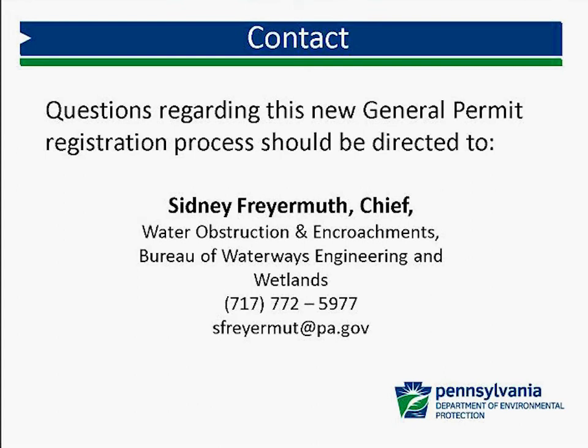Regarding the new impact table, can you please confirm that you are only looking for length and width dimensions and not direct area measurement? Yes, we are looking for length and width. It'll be up to you as the applicant to determine whether or not those areas are permanent or temporary, direct or indirect.